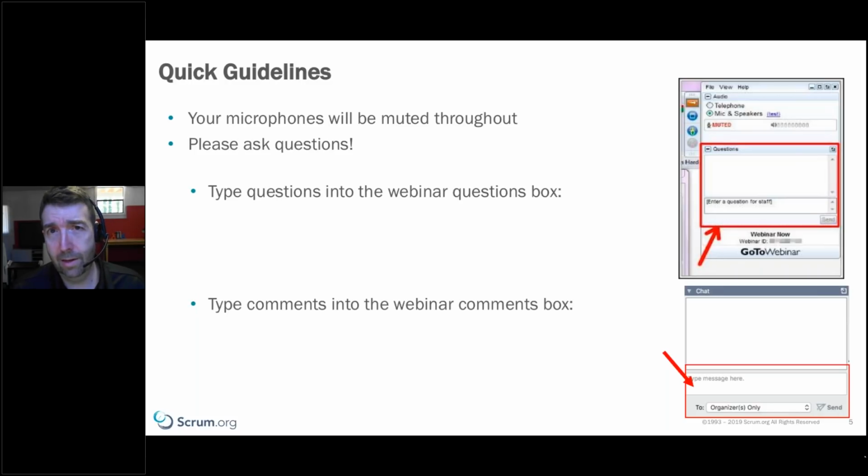So one piece of free advice I'll give about that topic is, have some team member shepherd that issue for a period of time. Have it be their responsibility to focus on communication and report in the daily scrums and at the sprint review about communication among the team members, and have other team members bring their concerns and complaints about that to the person who's shepherding the issue. And then you'll want to rotate and have somebody else shepherd the issue.